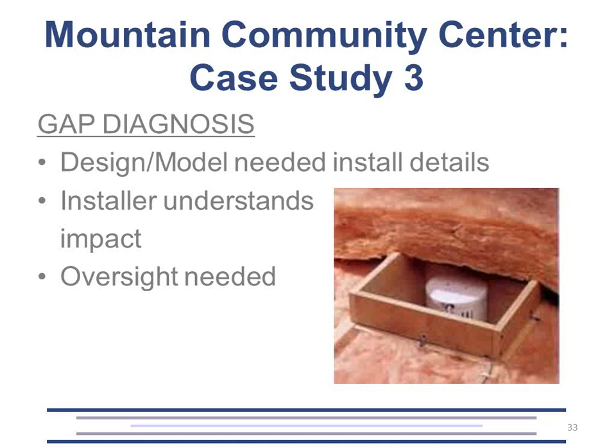Design, schedule, and financial constraints could have caused designers and energy modelers to not properly document the installation strategy details. And without proper communication, the installers may assume the easiest and cheapest way to insulate rather than following the designer's intent. Inadequate oversight was apparent, and communication with the designer and owner's rep was lacking.